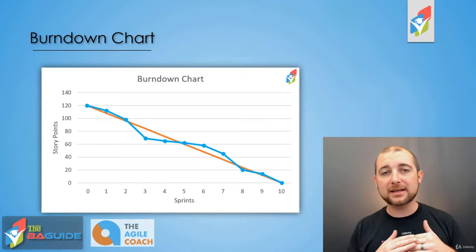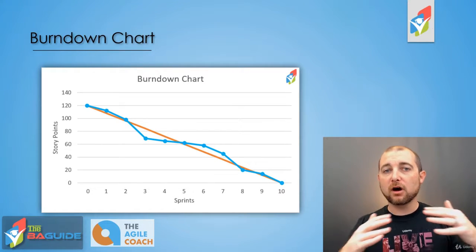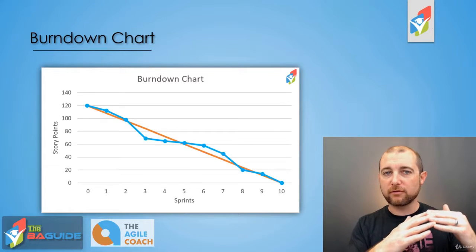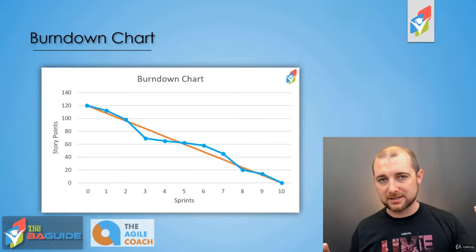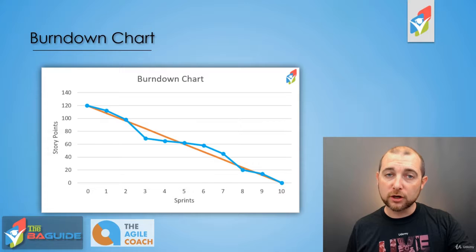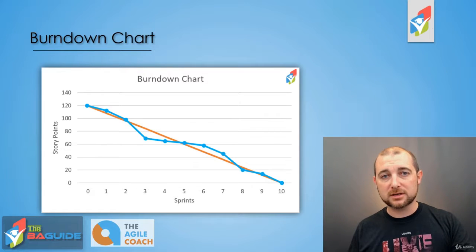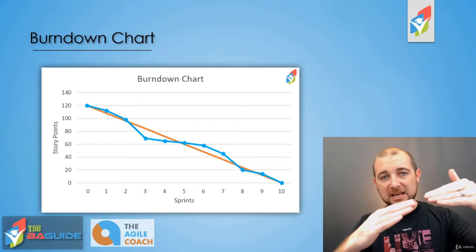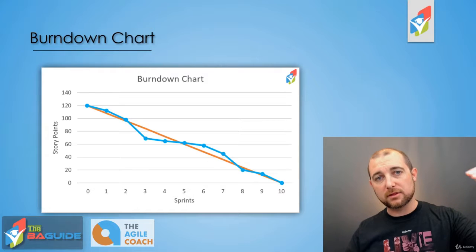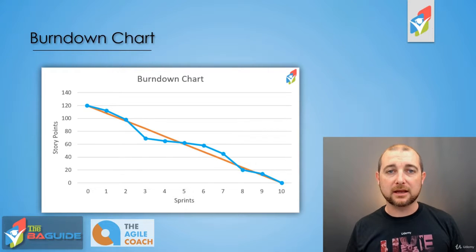The orange line is representative of what we want from a trending standpoint. For us to achieve our 120 story points in our 10 sprints, that orange line takes that into account — this is where we need to be in order to complete the project on time.